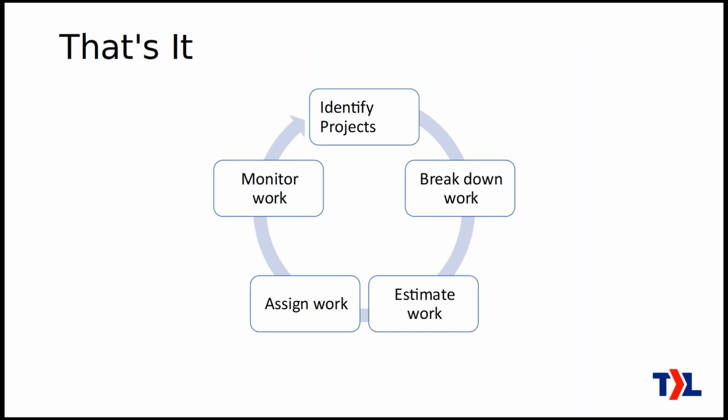That method also allows you to avoid a lot of work because when you put things into calendars, then all of the work depends on each other. If something that you thought was going to take 2 hours actually takes 4 hours, then that bumps back all the work that's behind it in the calendar. So it's actually a lot more work for everybody, the engineer and for you. So that's why we avoid that.